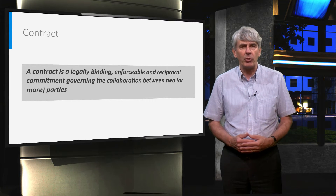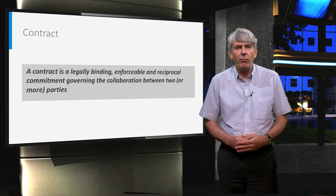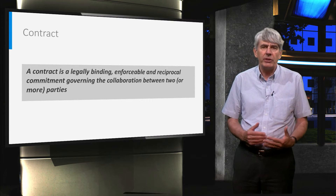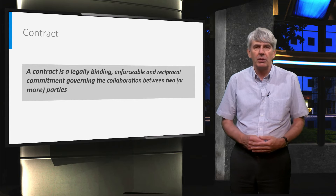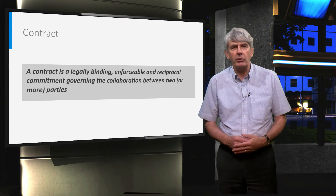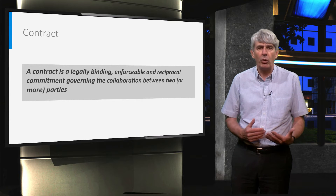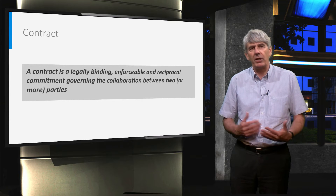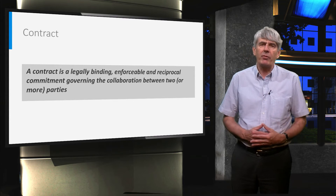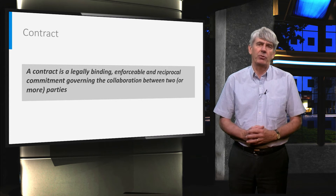In project management, the term contracting is often used for services — for instance, engineering construction — and the term procurement, or purchase order, is used for goods, for instance bulk materials and equipment items. From a legal perspective however, there is no distinction. Both are contracts.